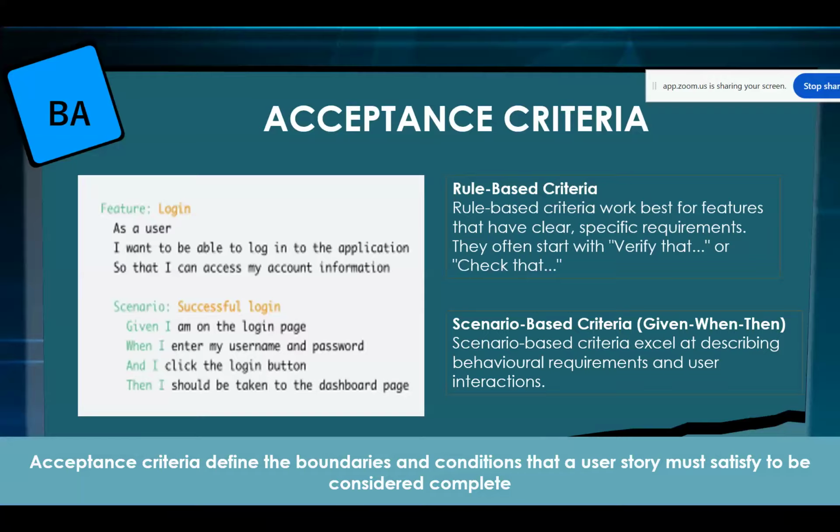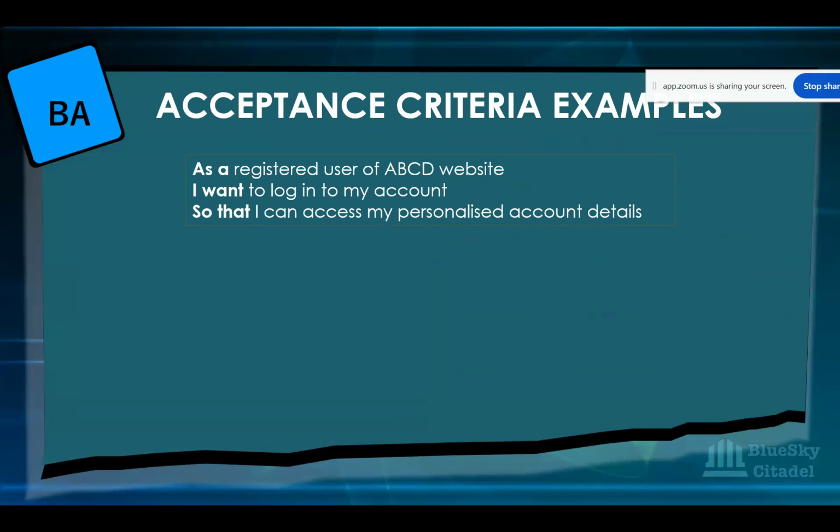So like I said, acceptance criteria, I beg your pardon, is the condition that a user story must satisfy before it can be passed as correct, complete, done. Yes, I'm happy with it. If it fails any of these lines, the QAs will raise a bug. They'll say there's a problem. This thing is not acting the way we want it to act. And it goes back to the developer who will correct it before it comes back to them again. And they'll check it again. And when it passes, they're like, we're good. It's passed.